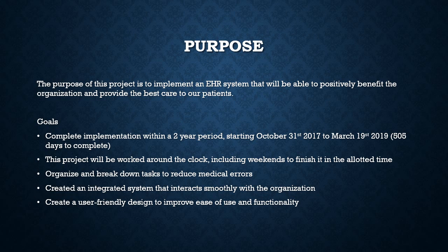Some of the goals for this project are to complete the implementation within a 2-year period, starting from October 31st of 2017 all the way up till March 19 of 2019, and this would take a total of 505 days to complete. This includes weekends, so the project will be worked around the clock in order to fit into the allotted time schedule.